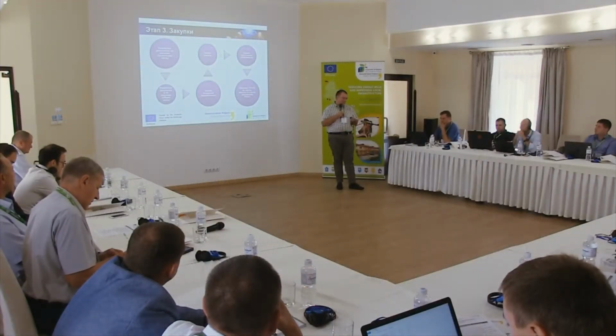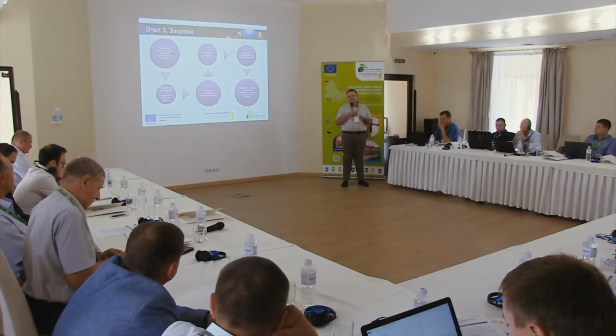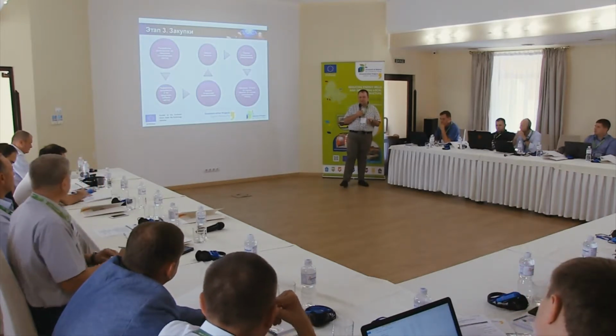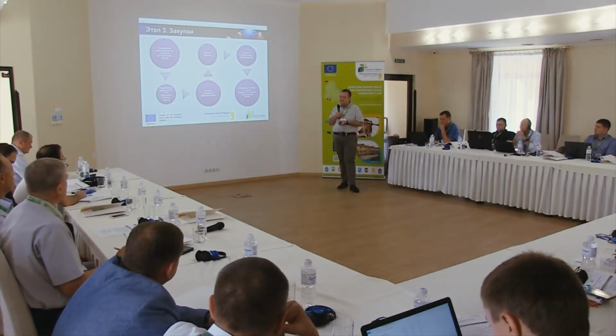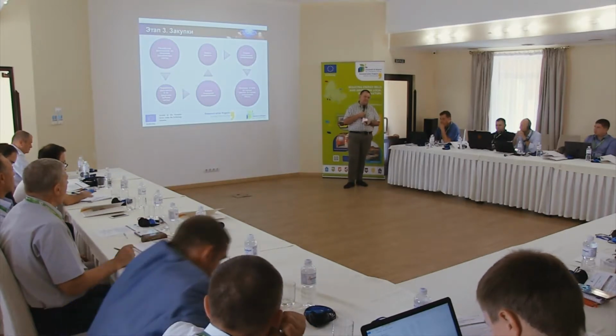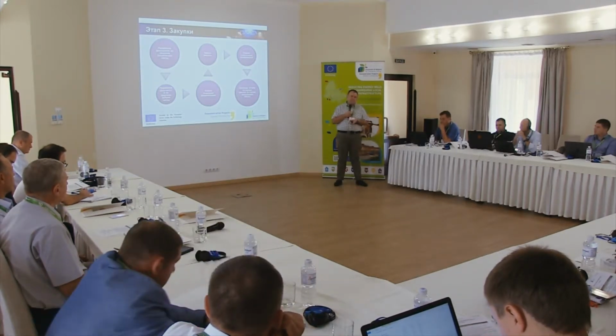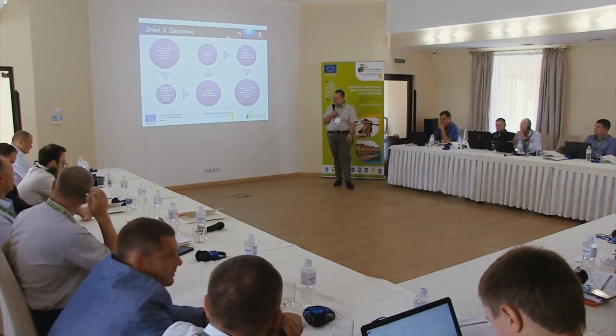In case you cannot do it or you do not want to use the national procurement rules or standards, you always have a chance to use the European rules, PRAG, and as the projects are funded by the European Union, all the templates and samples are available at the website of the European Commission.